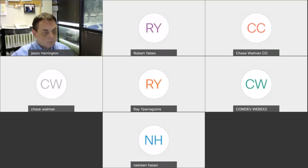Another one that maybe we could address: how long will this take to construct? We don't have a time frame yet for it. Just comparing it to some of our other projects of a similar scope, it would probably be a minimum of 8 months, but the contractor would dictate their schedule and their construction phasing for the project. We plan to go into construction in 2022, and that was part of our next steps slides, unfortunately.